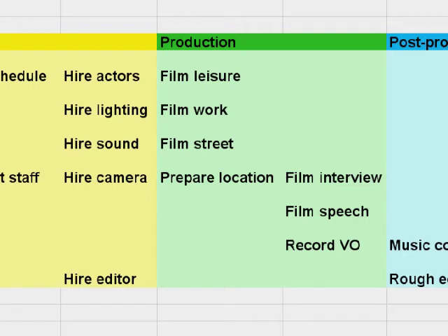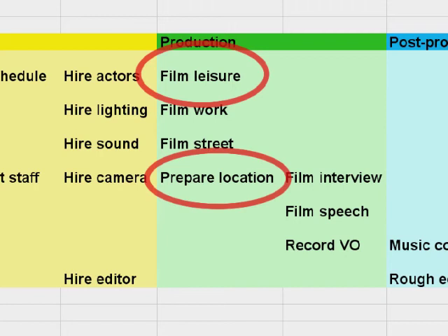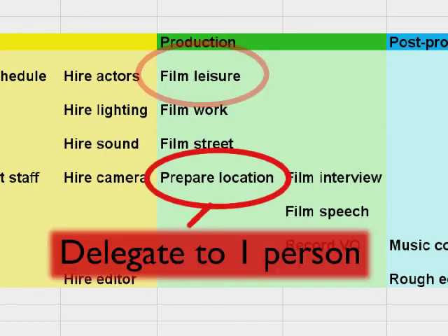Responsibilities and resources. The dependency network should allow an optimal use of time and resources, and will probably reveal periods in which there are several tasks being undertaken simultaneously. For example, whilst the film crew are getting shots of the politician relaxing, another crew are preparing the politician's home for interview. In such cases, the project manager cannot be in 2 places at once, and to be effective, they must delegate responsibility for some of the tasks. Delegated tasks must be made the responsibility of only one person, otherwise the buck can too easily be passed.